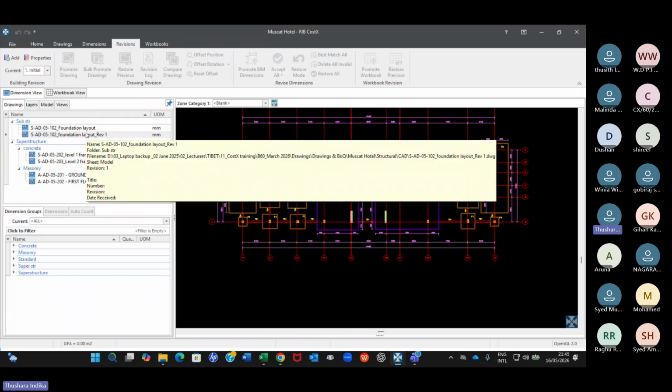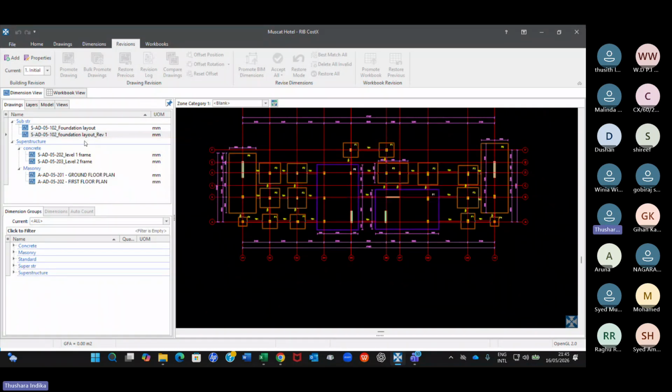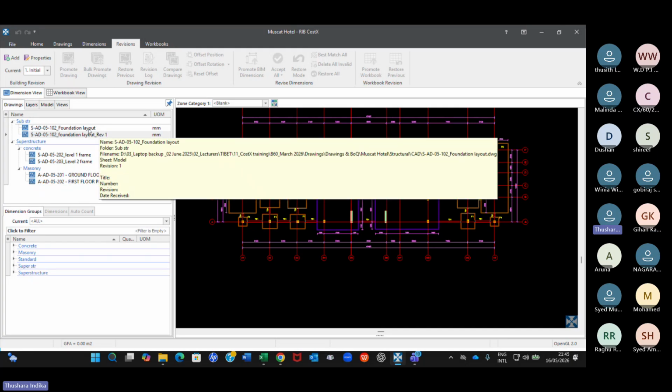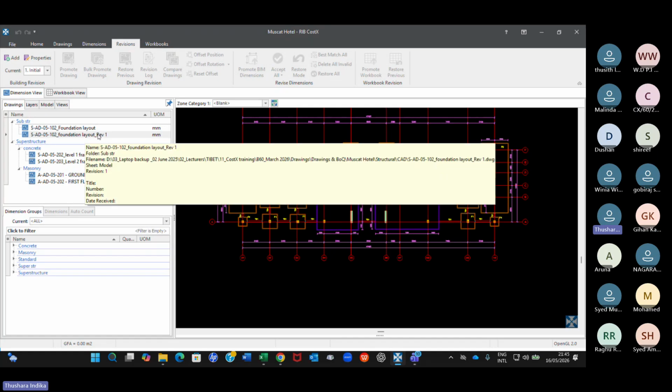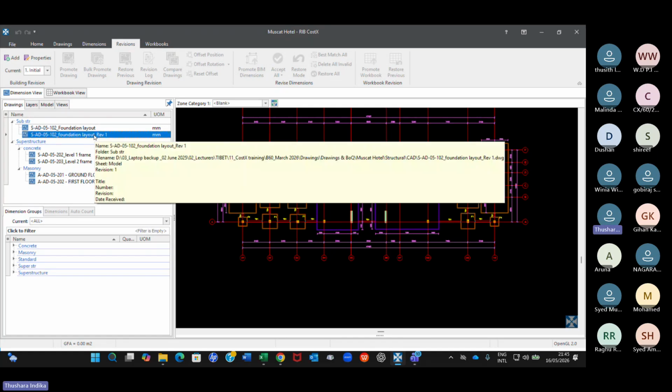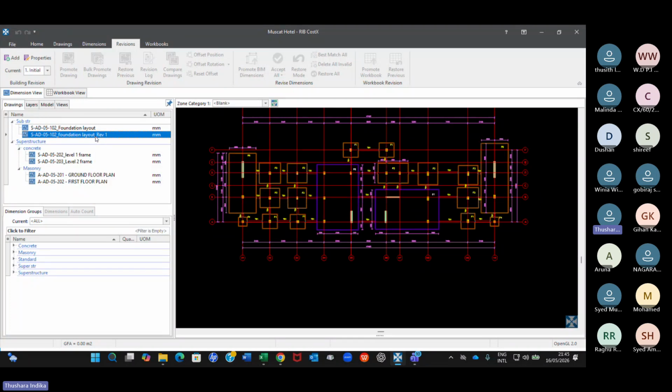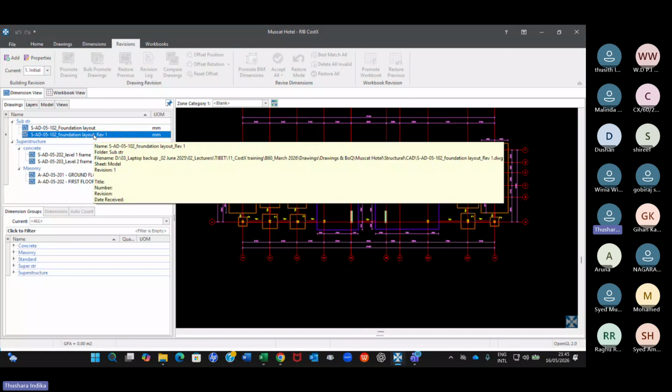Now in this case, you have about 4-5 steps to handle. When you do the revisioning, that means if you want to update the quantities of the BOQ, you cannot firstly add the revision drawing. Therefore, I'm going to delete this now. It's an altogether different methodology. Now you have learned about comparison, just forget it and remove this drawing. That's all, because we have not measured from this drawing anyway.